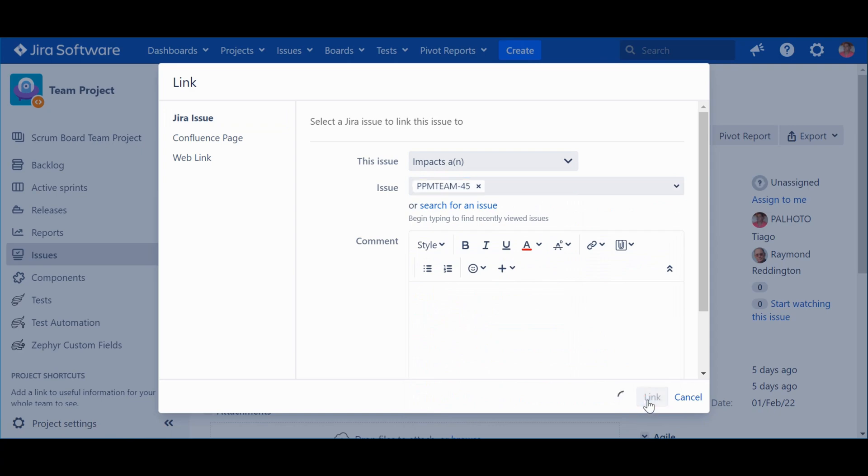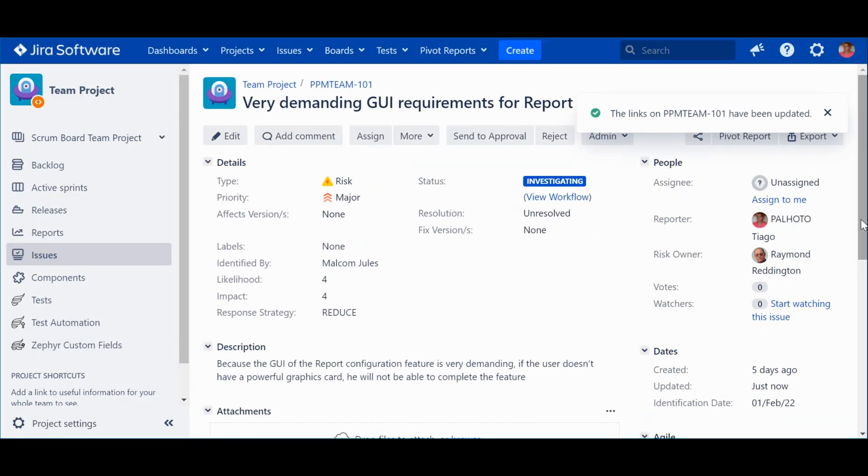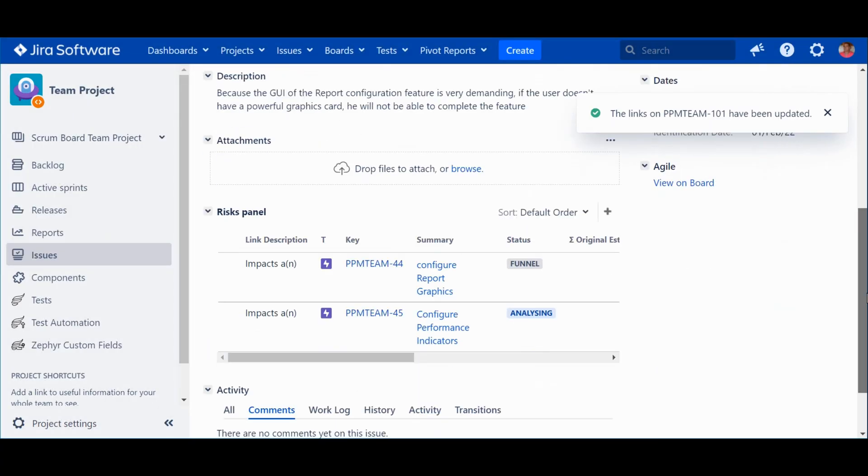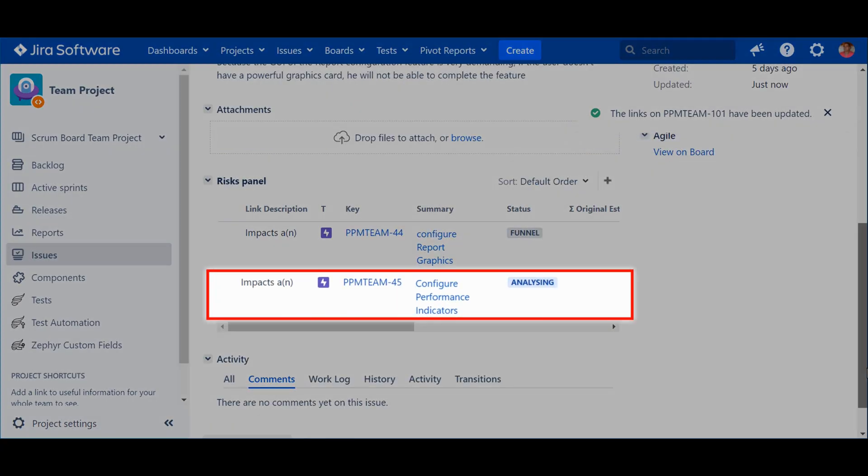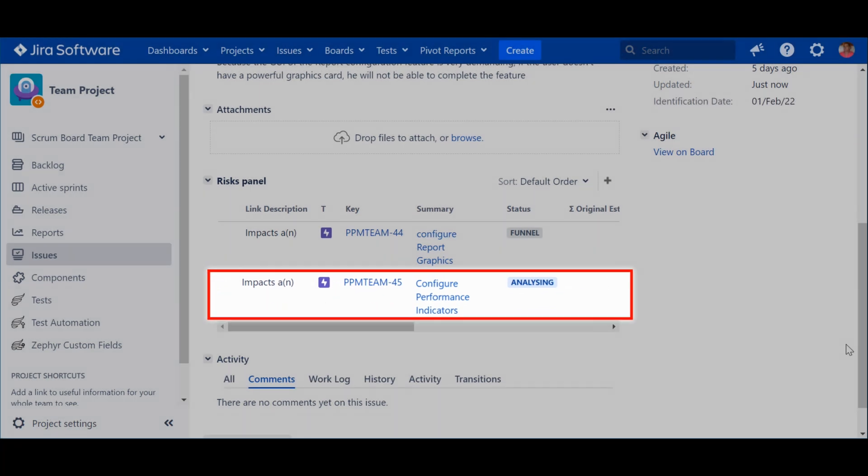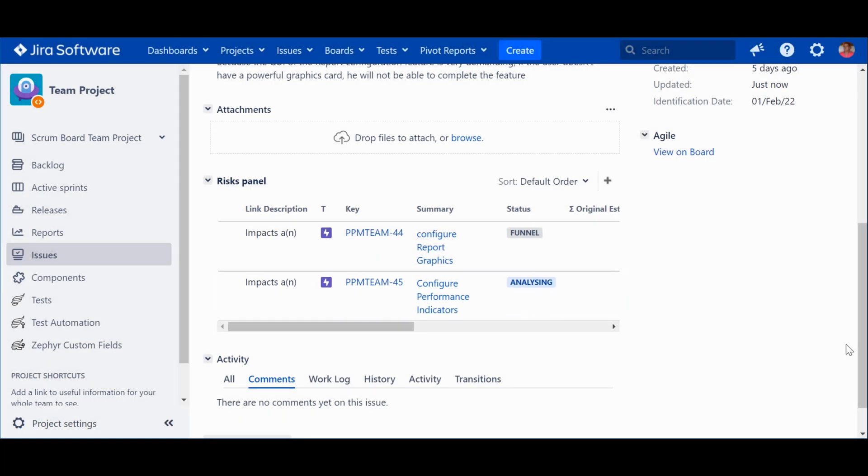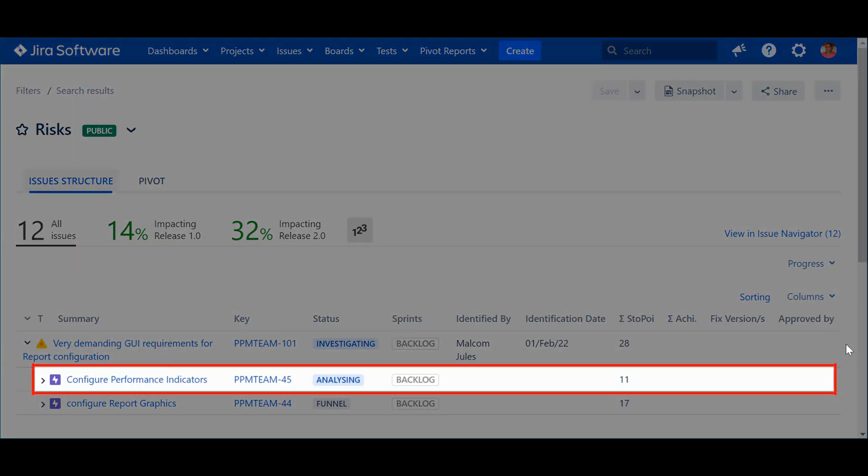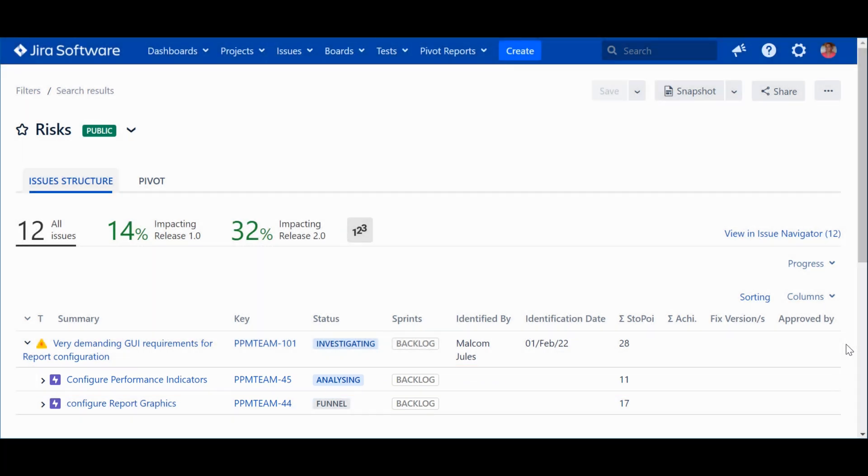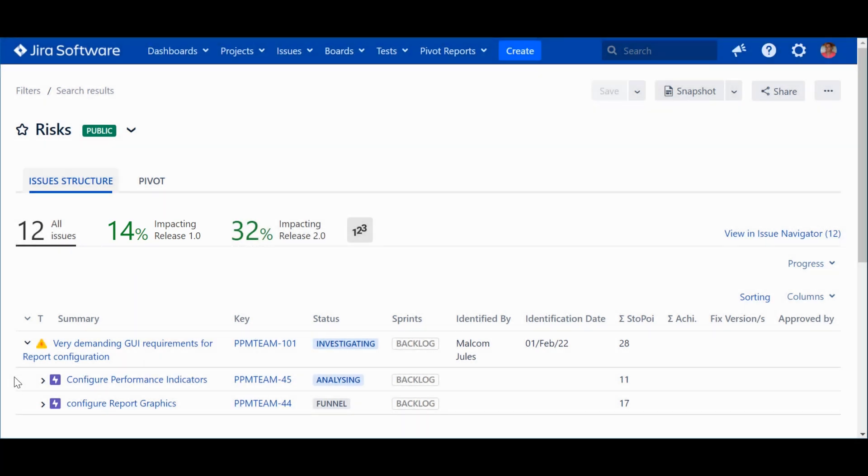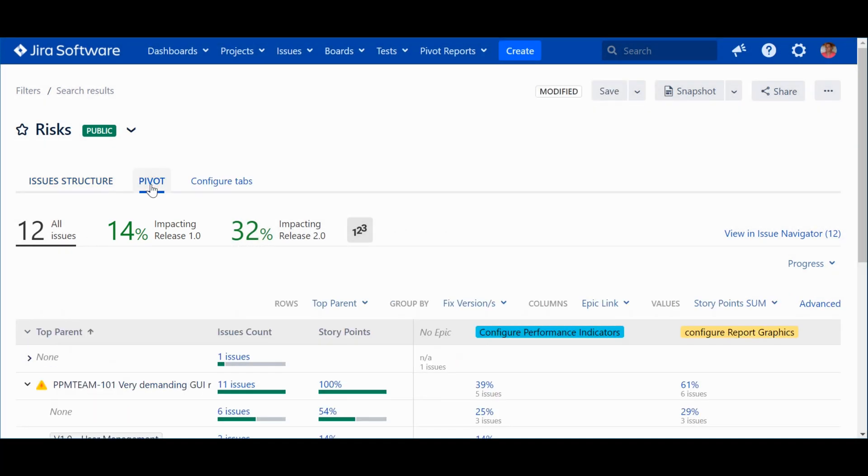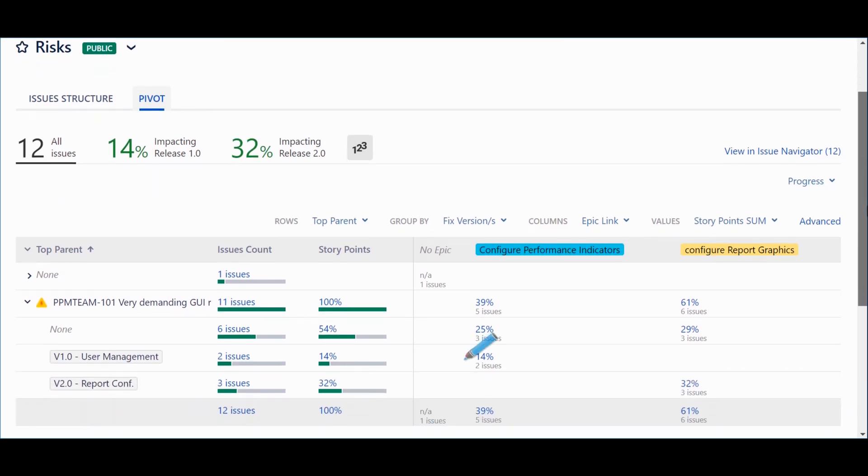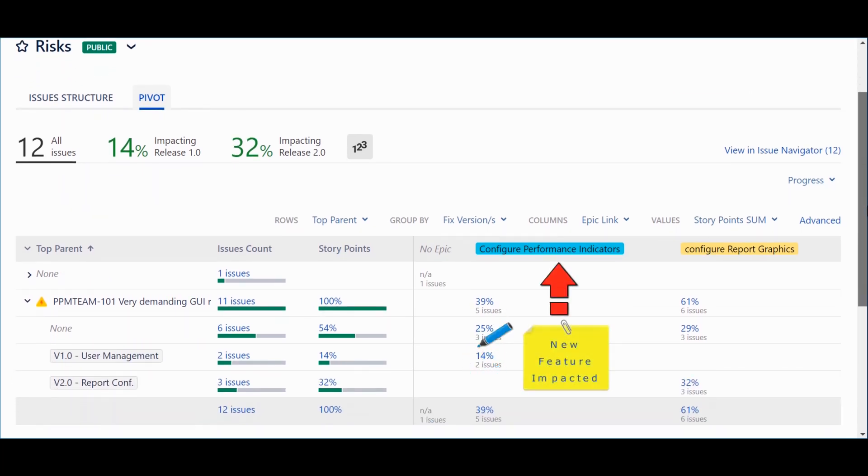Now, let's see what happened in our Risks report. The new feature that is impacted by the risk is now visible, as well as the fact that Release 1.0 will also be impacted. Here, it's also visible how the impact of the risk also spread to Release 1.0.